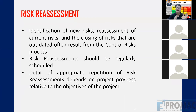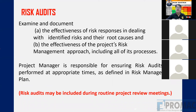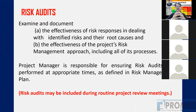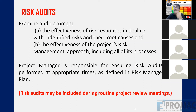Risk reassessment is done periodically — we assess whether risks are occurring and what impact they are bringing. Risk audit ensures that standard procedures for risk management are being followed and that risk responses are effective in dealing with identified risks and their root causes. The project manager is responsible for ensuring risk audits are conducted periodically, perhaps every month.